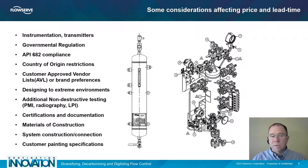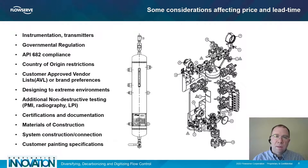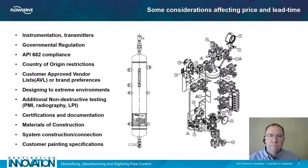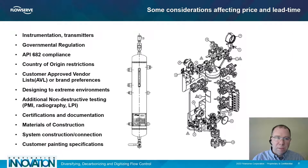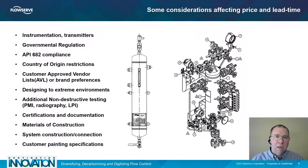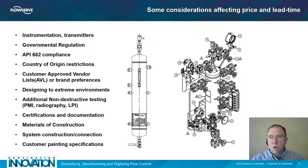The system of construction and the connections used within the piping plan itself are also very important to consider. Piping is much more expensive than tubing, and moving from MPT connections to Class 600, Class 1500, or even higher flange ratings can significantly affect your cost and lead time.